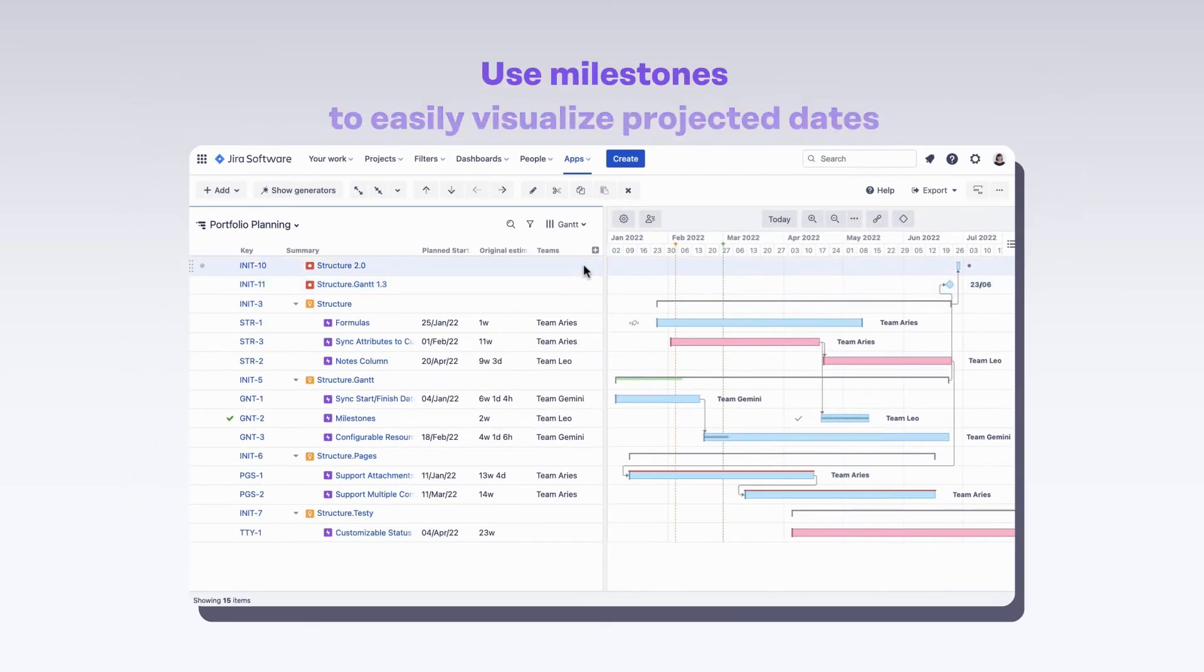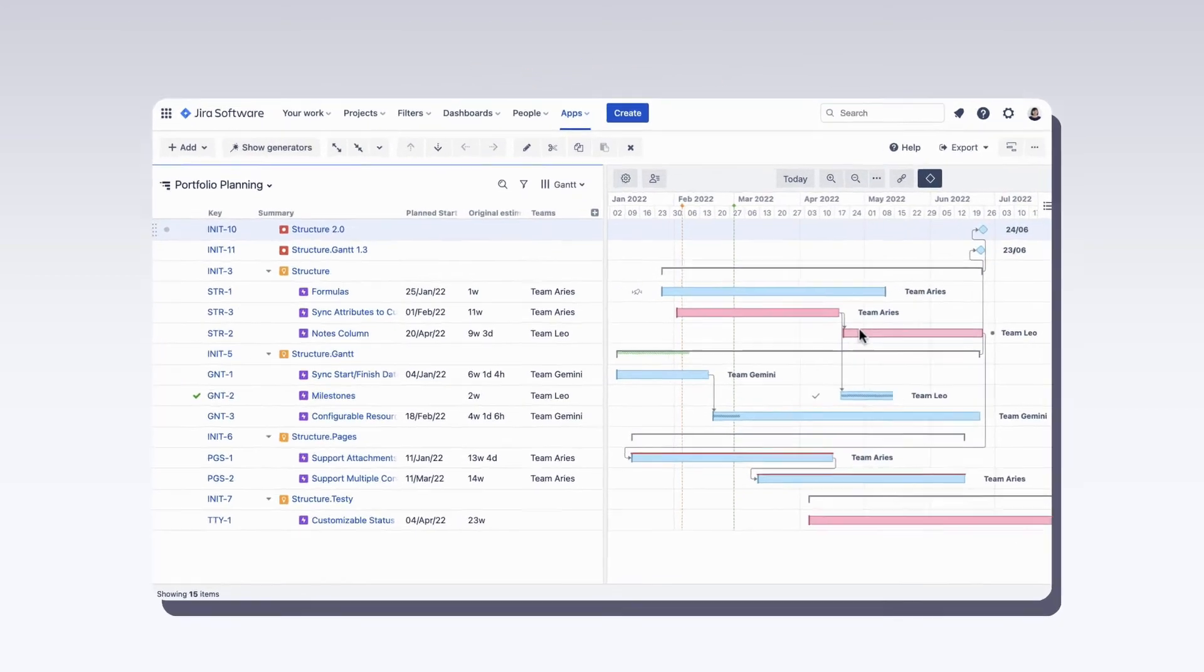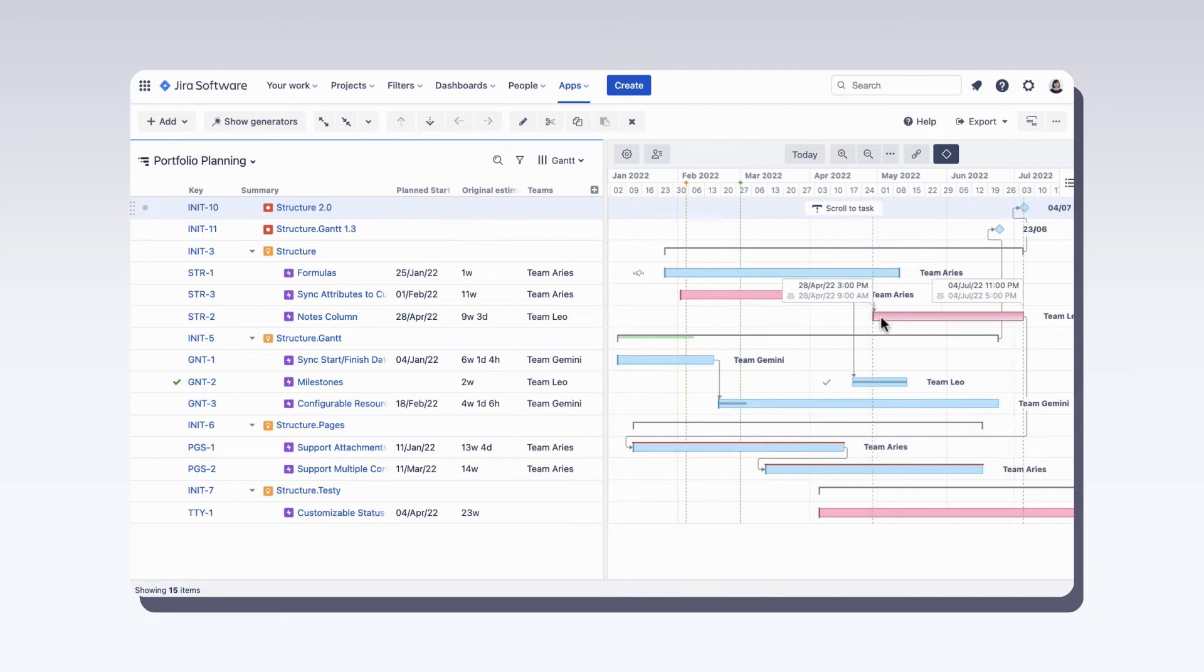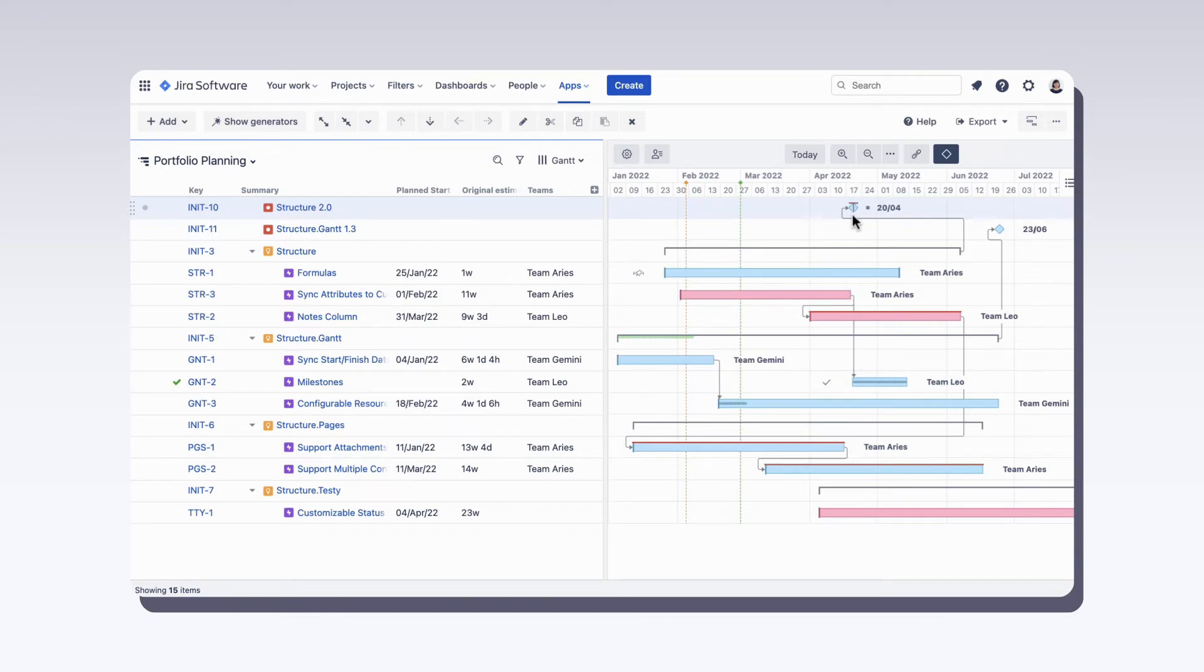Milestones are another useful feature. Structured Gantt can show them however you'd like to define them, so you can easily visualize projected finish dates. Alternatively, you can set fixed milestone dates yourself and use them to check if your release is on track.